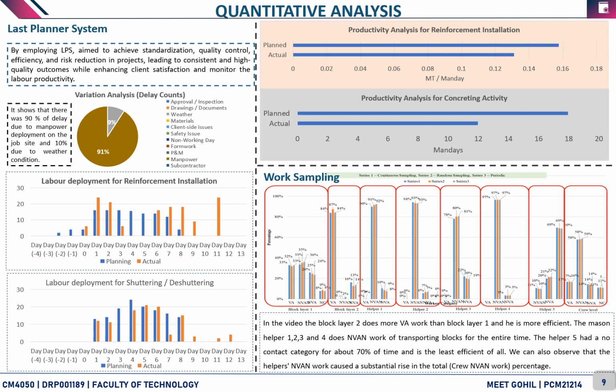The project faced a significant requirement for skilled laborers to handle finishing work, but the subcontractor's insufficiency in providing such skilled labor led to change in priorities of the work. Several unavoidable obstacles were encountered during the implementation process, including lack of commitment to change and innovation, unrealistic expectation, and subcontractors' failure to fulfill their promises.